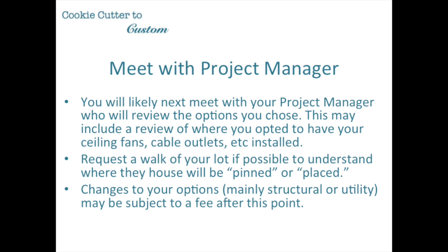Now if you can, it's a great idea to request a walkthrough of your lot if possible to understand where the house will be pinned. It's also a great time for you to ask questions about the grading of the lot and so on and so forth. Now after this meeting with your project manager, any changes you make to your options, mainly the structural or utility ones, may be subject to a fee after this point.